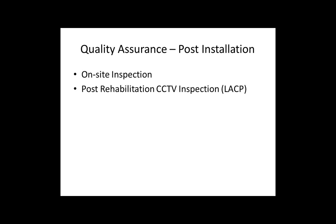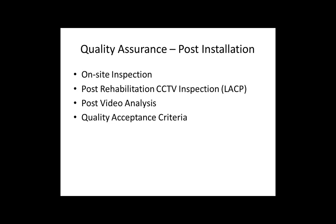During the post-installation phase, it is highly recommended to have an on-site inspector. It is also recommended that a post-rehabilitation CCTV inspection in accordance with LACP guidelines be conducted. It is very important to analyze post-videos obtained through post-rehabilitation CCTV inspection, and it is very important that there will be a list of quality acceptance criteria — it should be very clear whether a certain rehabilitation clears the acceptance criteria or not.